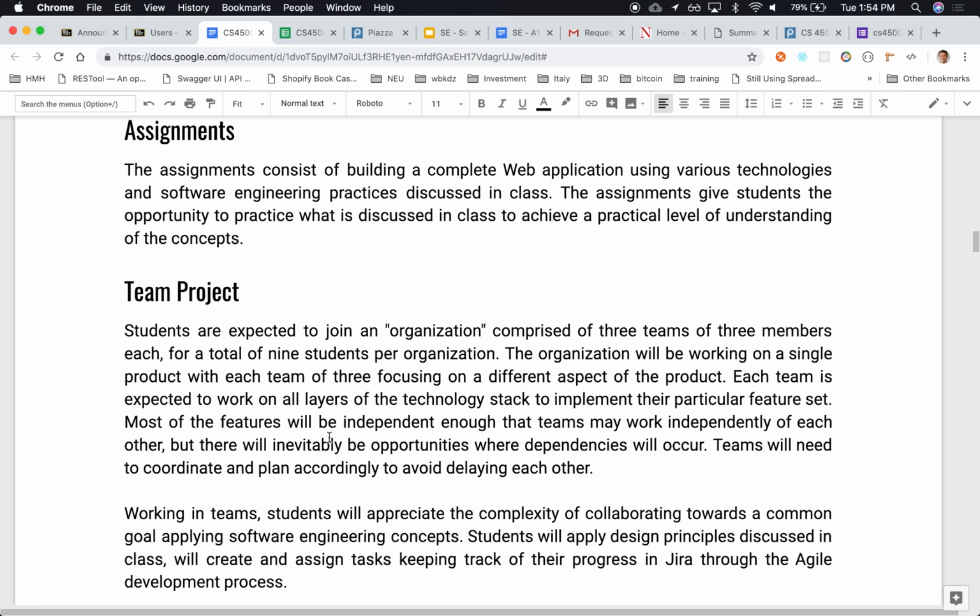You'll be expected to use the skill you just learned going forward throughout the entire project. So if you learn how to parse and read through a requirements document, you'll be expected to document it as a use case, identify the actors, identify the domain objects, identify the exception cases and how to handle them, and then create the test cases that you're going to use for testing those use cases. And you need to do that for all new assignments going forward, because that's a very common thing.